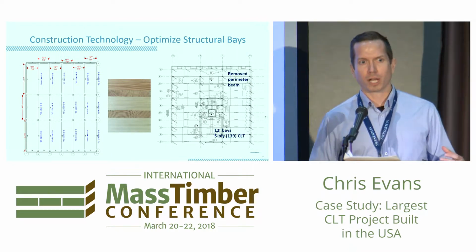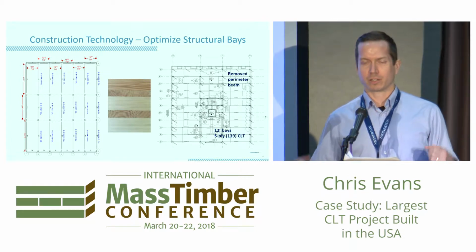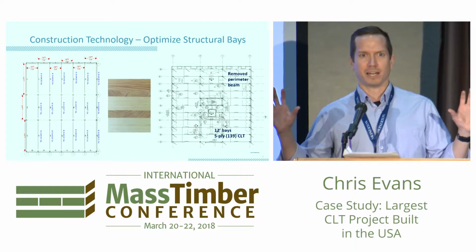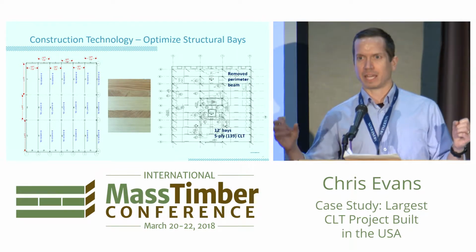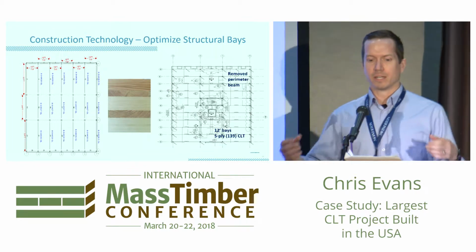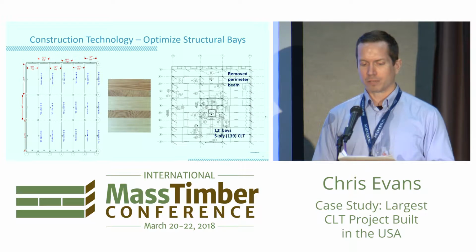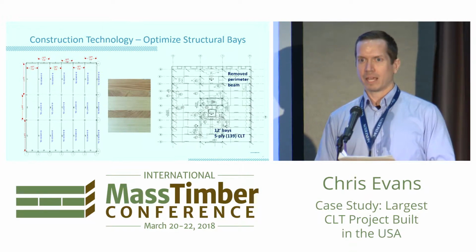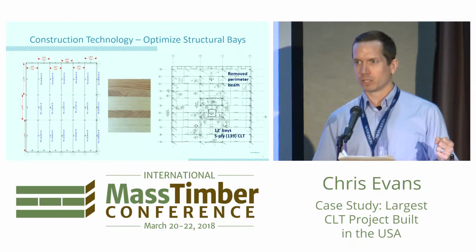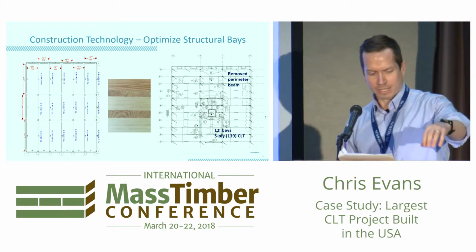entire construction process. The first thing we heard is mass timber is really quick. You can go quick. But everybody was kind of focusing on the timber and not necessarily focusing on the follow-on trades. So we set up at the beginning with OEG, with GlueMac, with Apollo. We said, how can we get to a place where we prefabricate everything, pre-drill the glue lam, and set up the project for success that way.